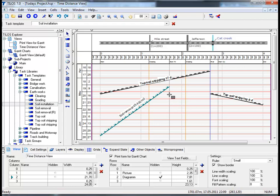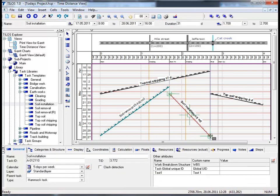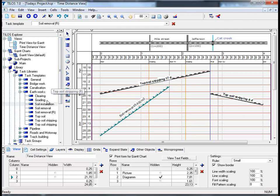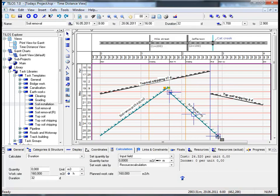Moving into the working area, press your left mouse button down and draw the task from 1700 to 3000. Having made these adjustments, let's concentrate on filling the soil that was removed in the former task - the 45,400 cubic meters - to a different section in the working area. Click on the Insert Objects Toolbar, the Insert Task icon, and choose Soil Installation from the TILUS Explorer. Draw the task from 1700 meters to 3000.